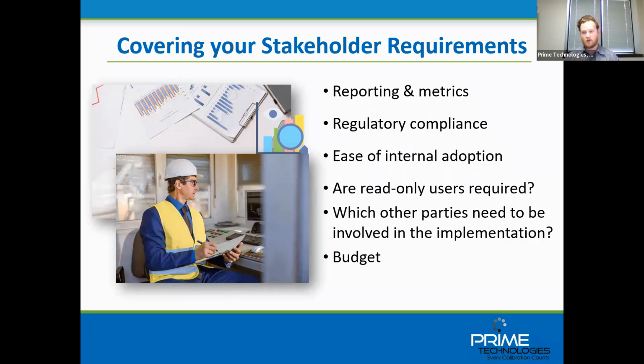because that could be a problem where, hypothetically, you decide you're moving forward with a system, and then your IS team comes in and wants to do an audit, and then they realize, oh, there are all these security flaws in the system, and then you'll have to go back to step one. This is just one of those things where there are going to be other parties involved in this, unless you own your company and you're working in a one-man shop, which is really great if you are. But a lot of us, and a lot of the attendees I see on the list here, are not in that situation, and they're going to be working in a much larger organization that's going to have to account for what others are doing.